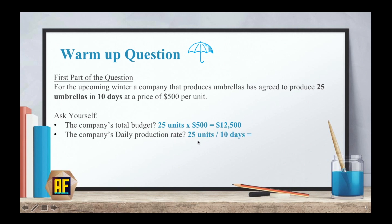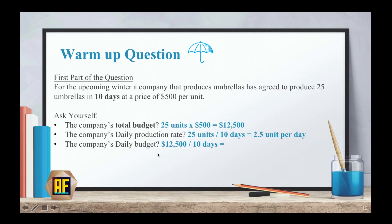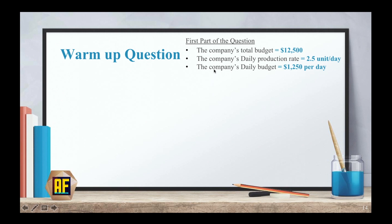The company's daily production rate is 25 units over 10 days, which equals 2.5 units per day, or 5 units every 2 days. The company's daily budget, which is the total budget over the total number of days, is $1,250 per day. Now that we know that, we can put everything we calculated on the upper right part of the screen and continue to the second part of the question.